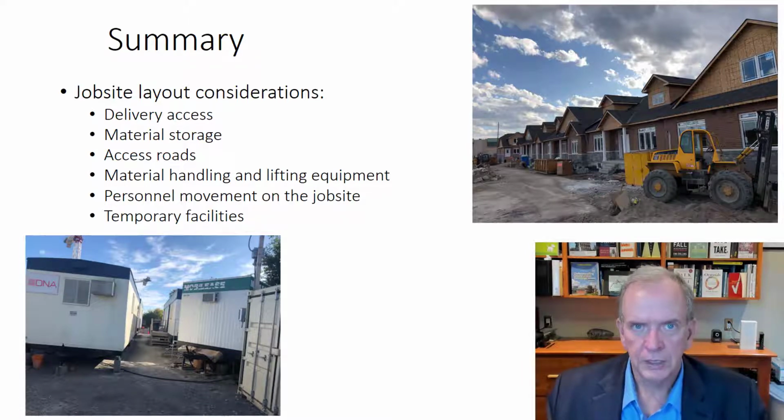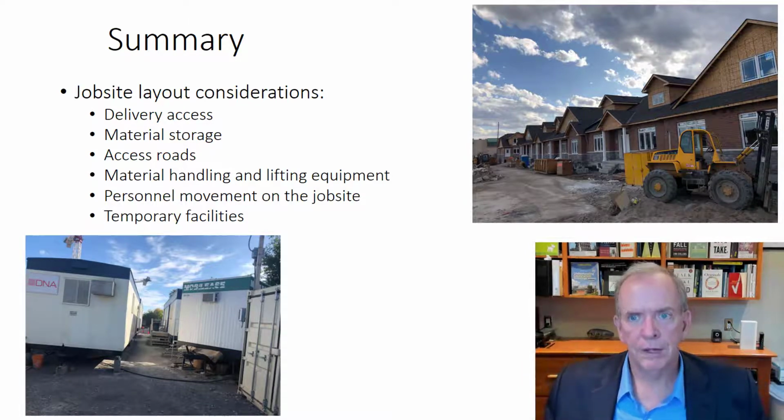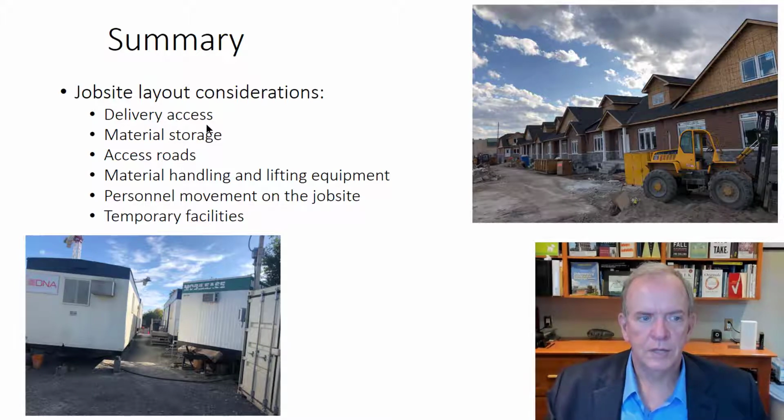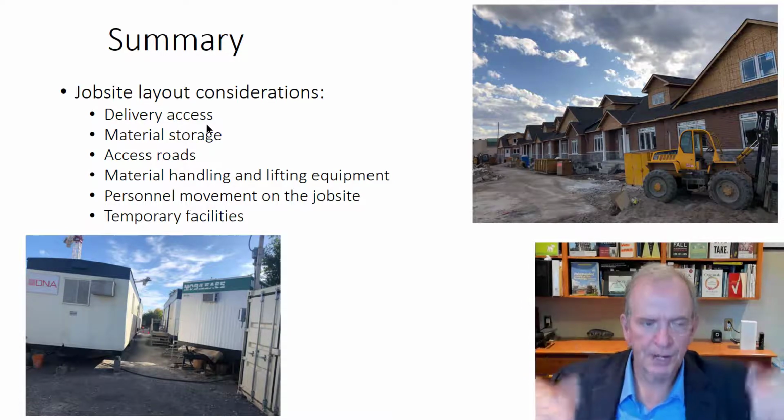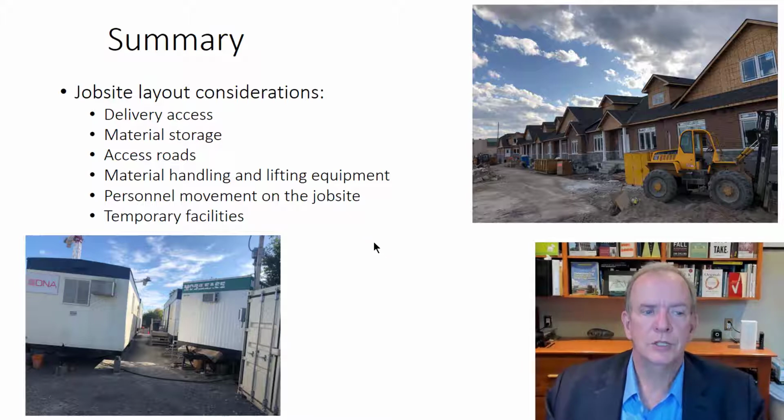Same thing with scaffolding. Maybe the brick masons put up the scaffolding, but maybe there's something that needs to be painted, or other work done. Well, maybe the scaffolding could stay up an extra day and that trade could get in and do it, and that could be coordinated. No point in taking down scaffolding and somebody else coming and putting scaffolding back up. You're looking for efficiencies wherever possible. And that'll help you, that'll help your project, that'll help your subcontractors, that'll help your clients.